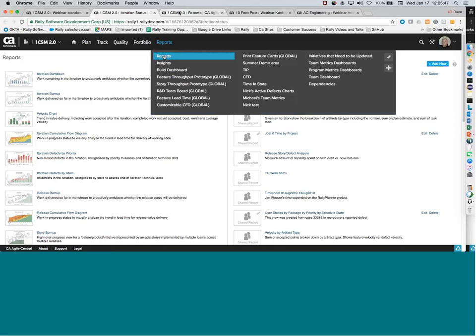Another problem, it's not necessarily a team problem, is late acceptance, or having that acceptance happen at the very end of the sprint. Certainly that could be a product owner not getting onto that quick enough, or maybe the work isn't ready until the end of the sprint. But we'd like to see more of a consistent flow that follows the ideal line that we've got on there.